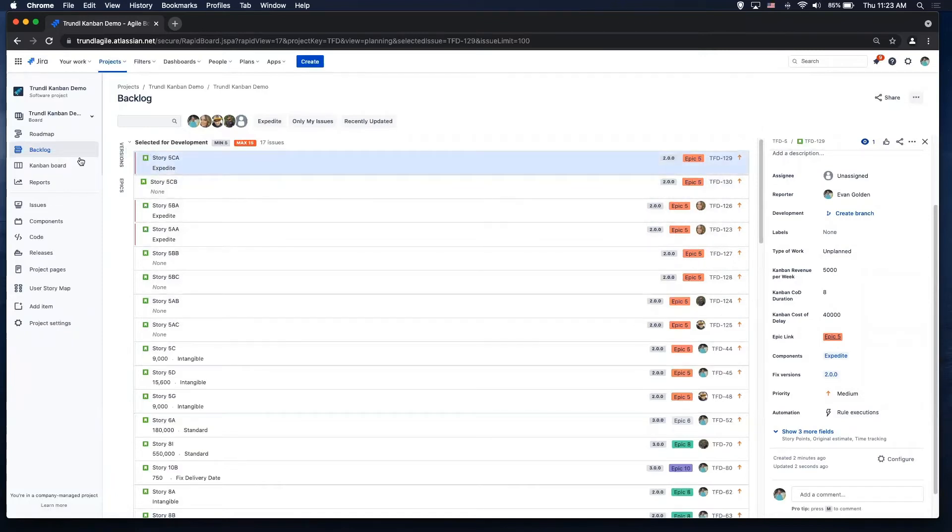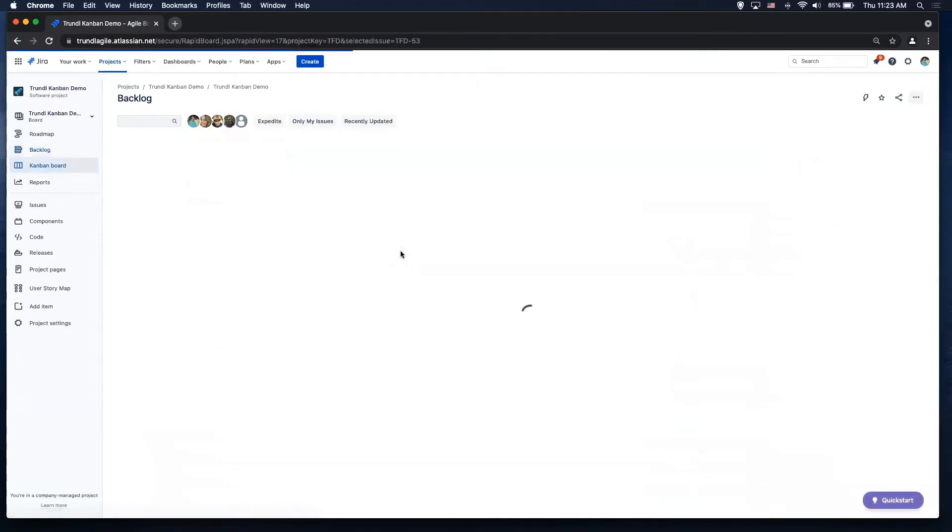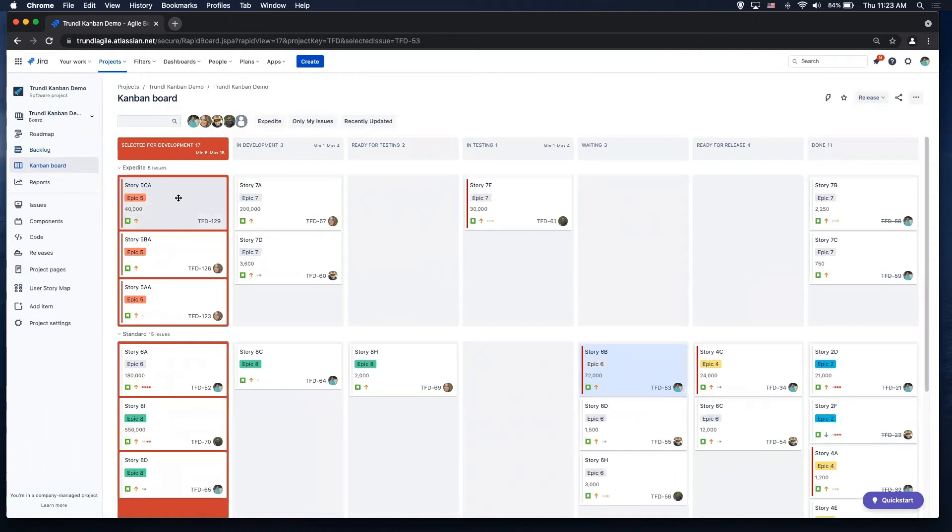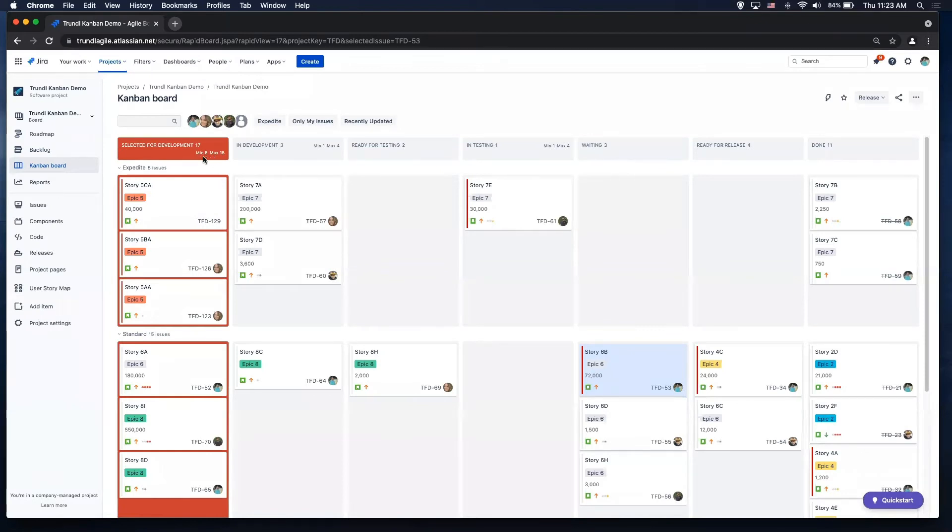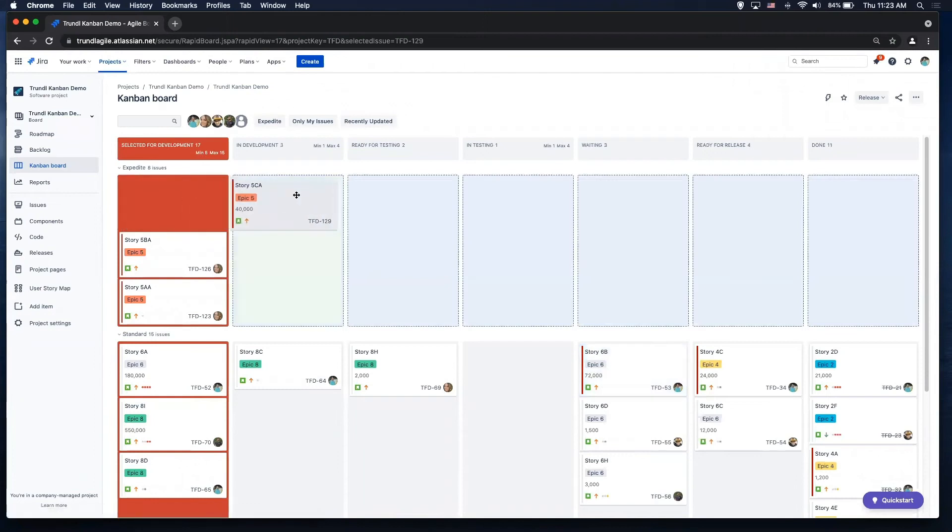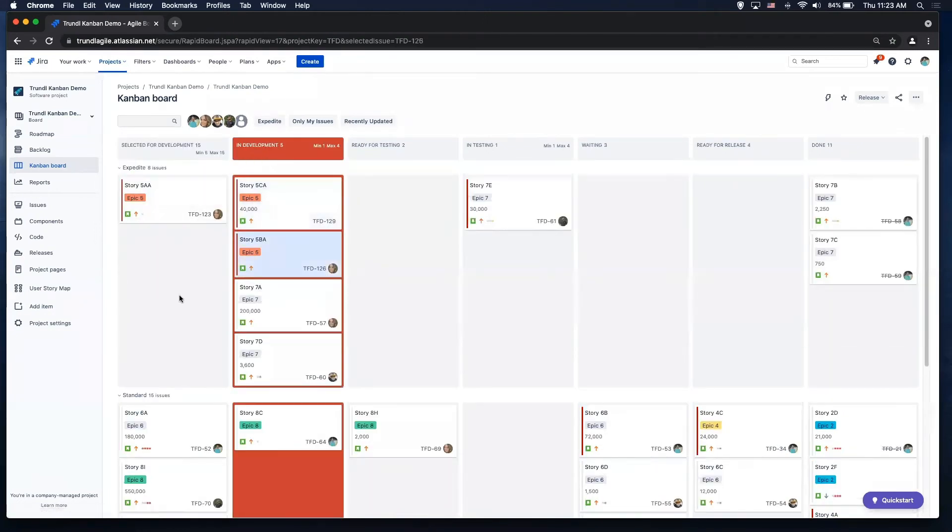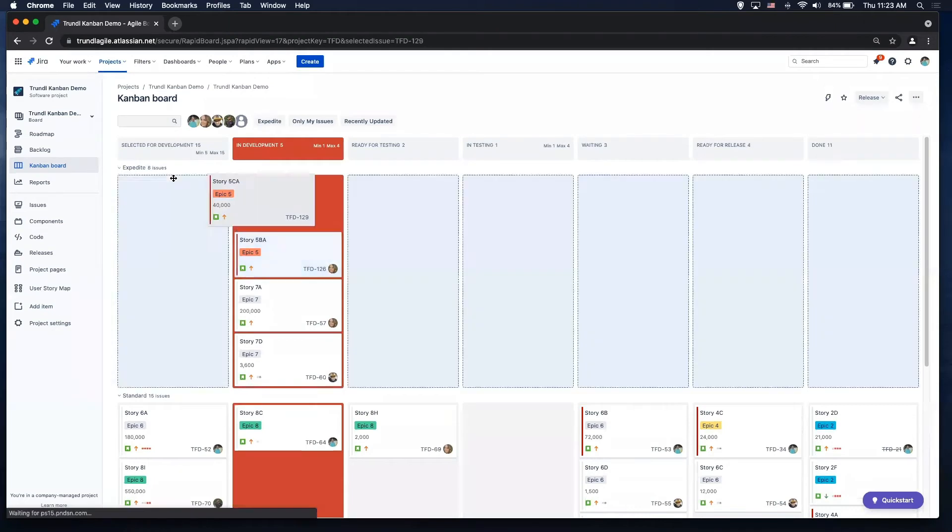So now I'm in selected for development and I'm doing my work. And you'll see the far left is selected for development. The reason why it's red is I've set some work in progress limits and I'll show you this in the board settings as well, but you'll see there's a minimum amount and there's a maximum amount. My minimum is five, my maximum is 15, I'm at 17. So I'm just going to move these over to show you that it'll clear it and then adjust it here as well.